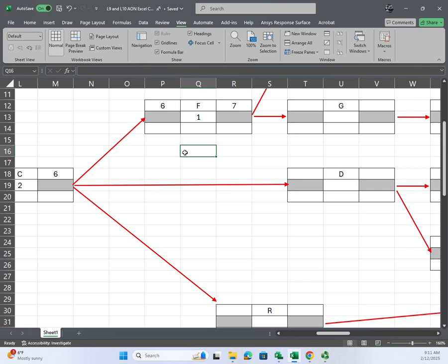And then the other bit is, let's say he takes way too long to do laying the brick, and you've got to get in and do the sheetrock. How do I crash the schedule so that I can get you started on time without getting him? So I may have to take part of his work, get extra manpower to get finished, or realize this is finished and I can let you in there early. And then try to get everything back on the schedule.